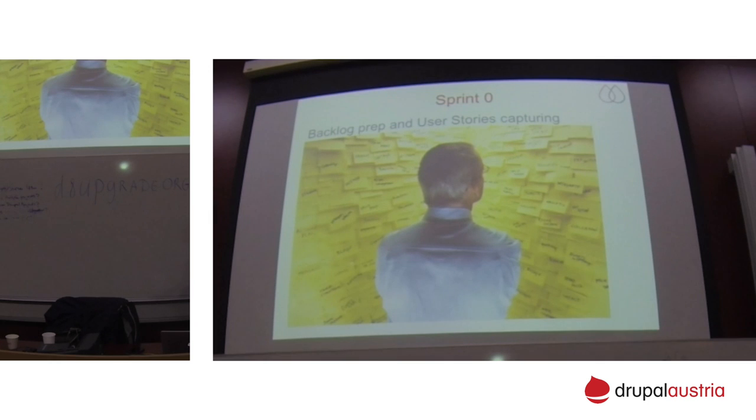We should definitely go with the sprint zero. In the sprint zero, you should explain to the client and convince him that you're not going to do some active development and you need to spend some time in order to be better prepared. So in Sprint Zero, we do the backlog preparation and we capture user stories. We are drawing architecture, we are talking with the business owners about their needs, about what they're expecting at the end.